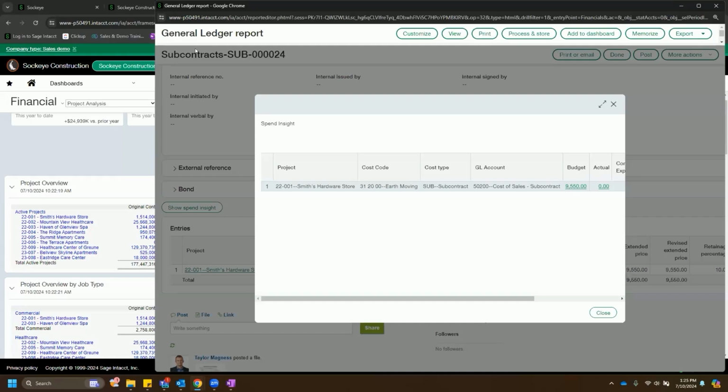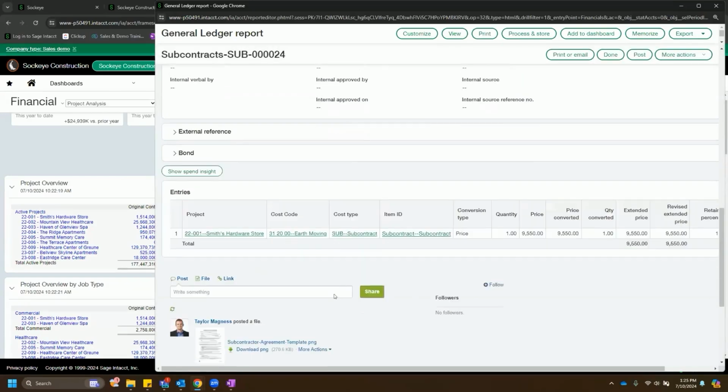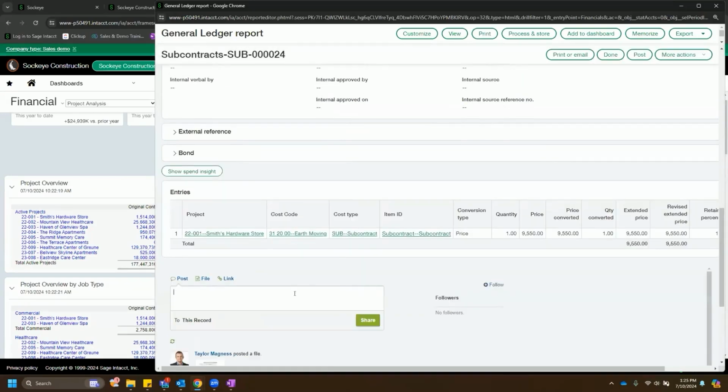The alternative to that is we can actually have it put a full stop on that transaction to the point where that user would need to save that transaction down in a draft form. So they won't lose any of their work, but they'll need to save it down in a draft form. And we will need to get a revision pushed through to this budget before that transaction will be allowed to pass and post. So just some guardrails essentially that we can put up both on the buyout side as well as on an ongoing basis, right? As that project is moving forward.